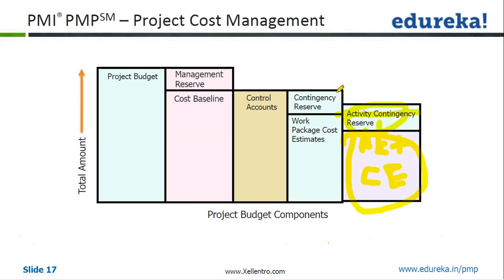At the work package level you may have a contingency reserve, and when you add all the work packages and their related contingency reserves, you get the control account level. One work package plus one contingency reserve gives you one control account related cost. Multiple work packages form one control account, and multiple control accounts added together give you your cost baseline. Once you get the cost baseline, you add the management reserve to arrive at your project budget.